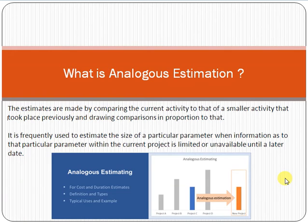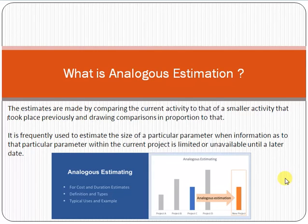You then talk with your technical leads and domain experts — this is called expert judgment. Analogous estimation is based on expert judgment. After discussion, you might decide: the older e-commerce project was done in five months; the new project is 20 percent more complex and has 20 percent more scope, so the new project will take six months and cost six thousand dollars.